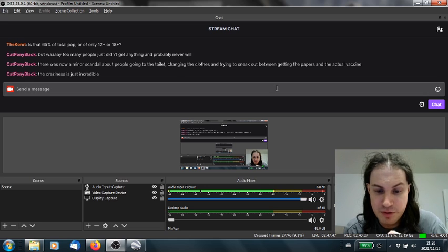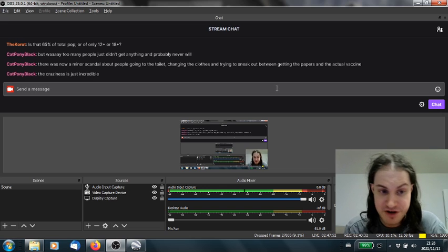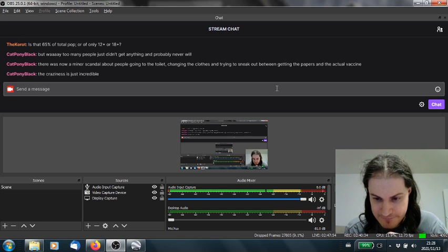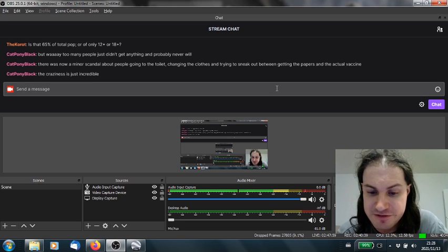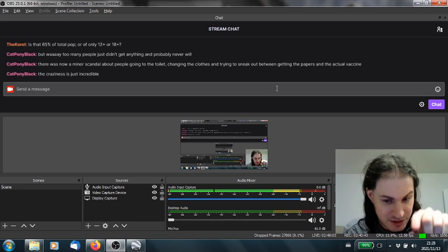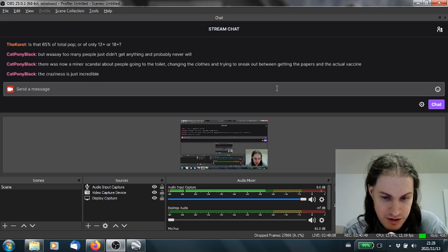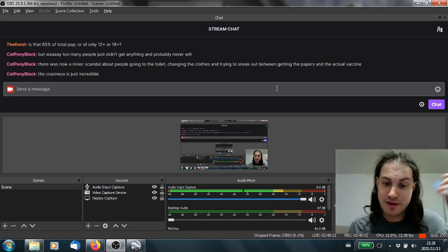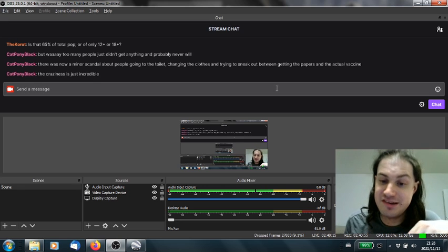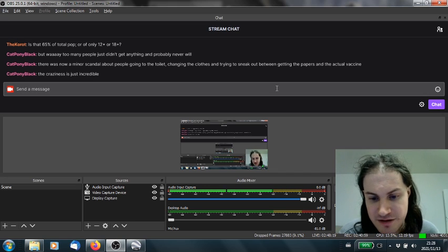In Sweden, I can find you individual contracts, let's say the finishes of a station, or the construction of a certain number of turnouts in the upgrade of a railway, or the electrification of a certain railway, things at that level of detail. With the cost range. Unfortunately, I've not been able to find the exact cost, only the expected cost range, because these are the documents that they put out to advertise this project to the contractors.